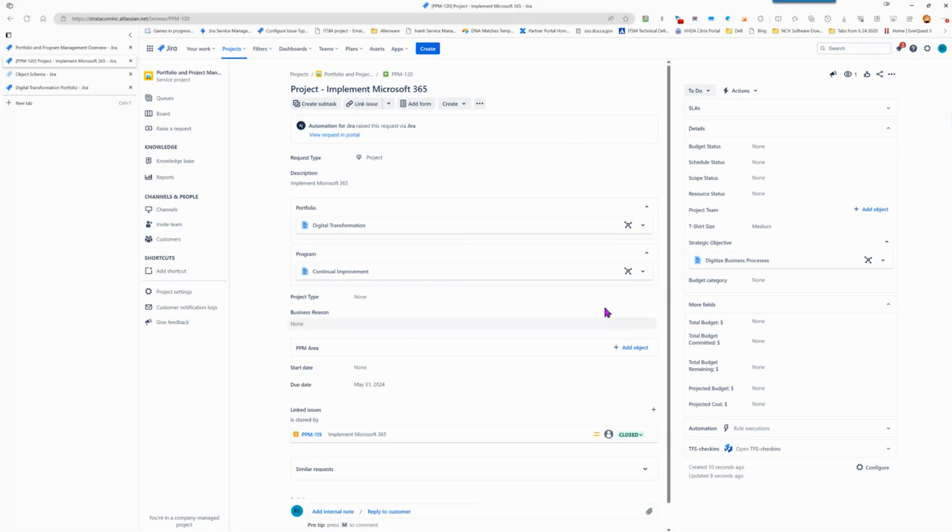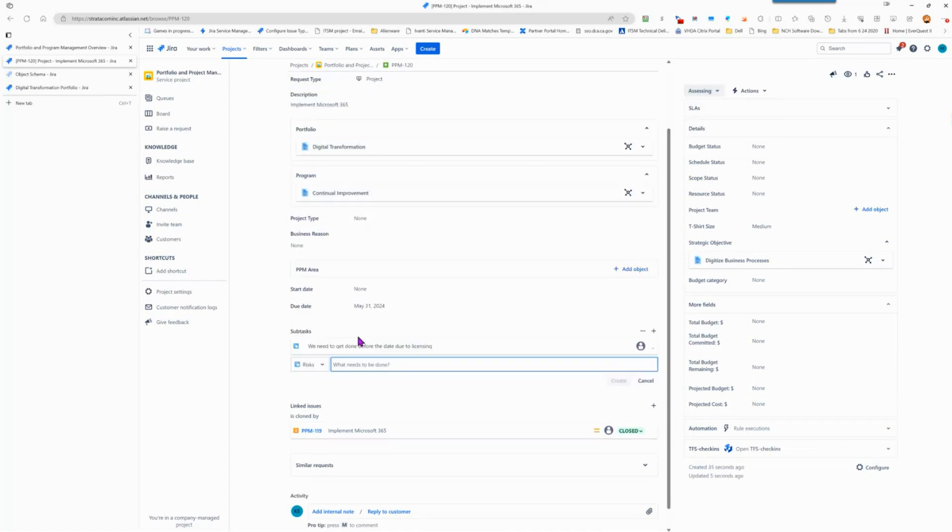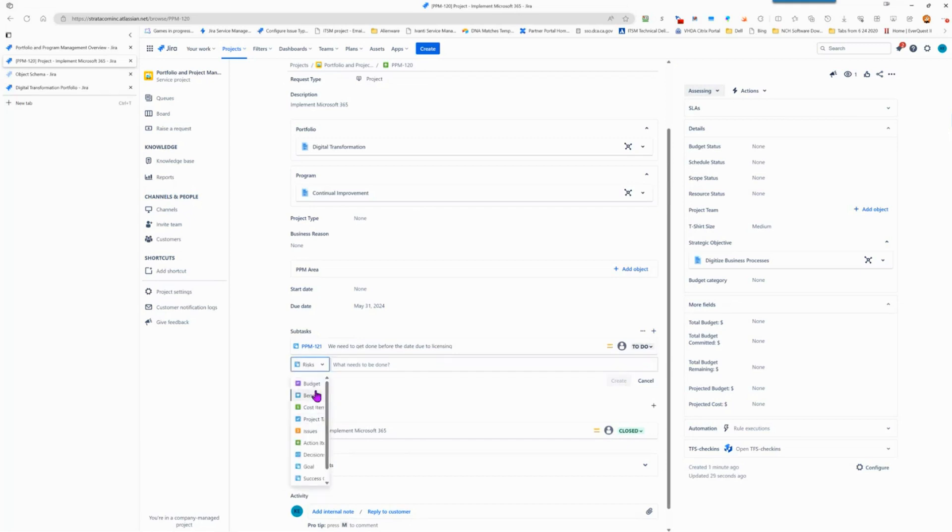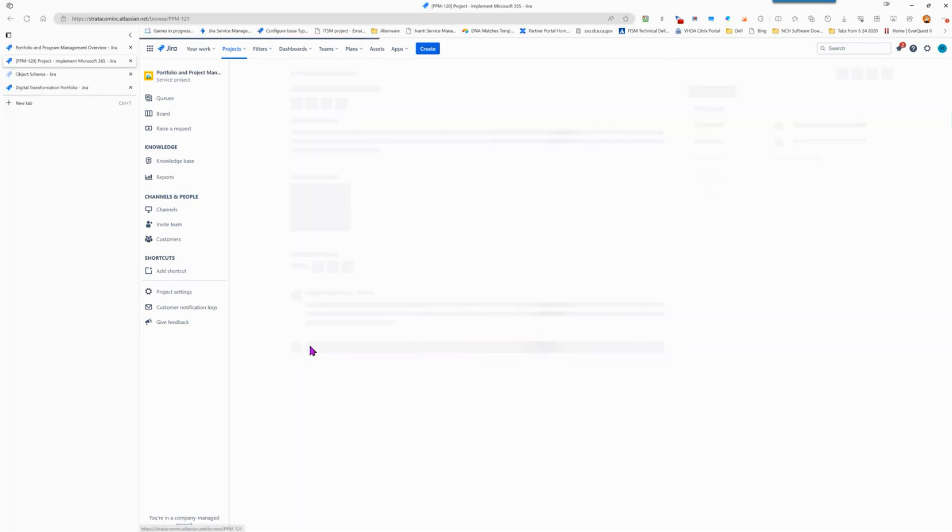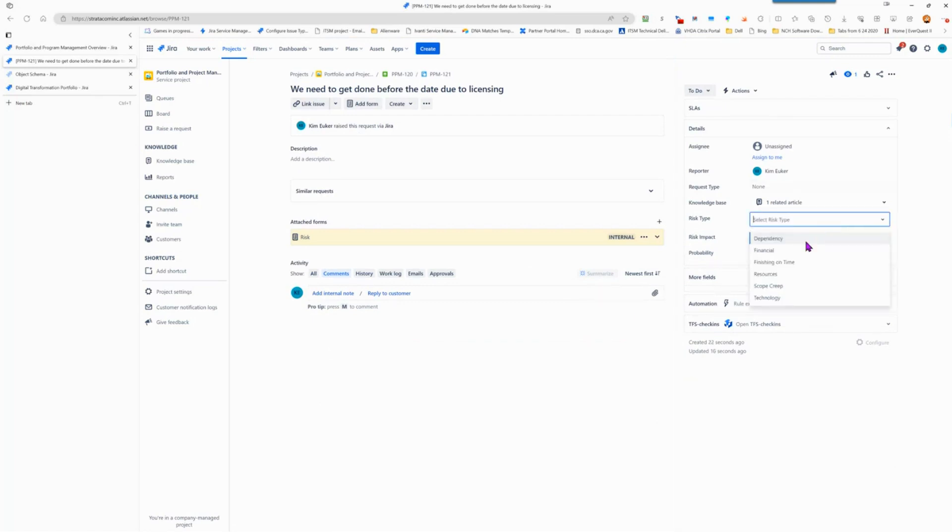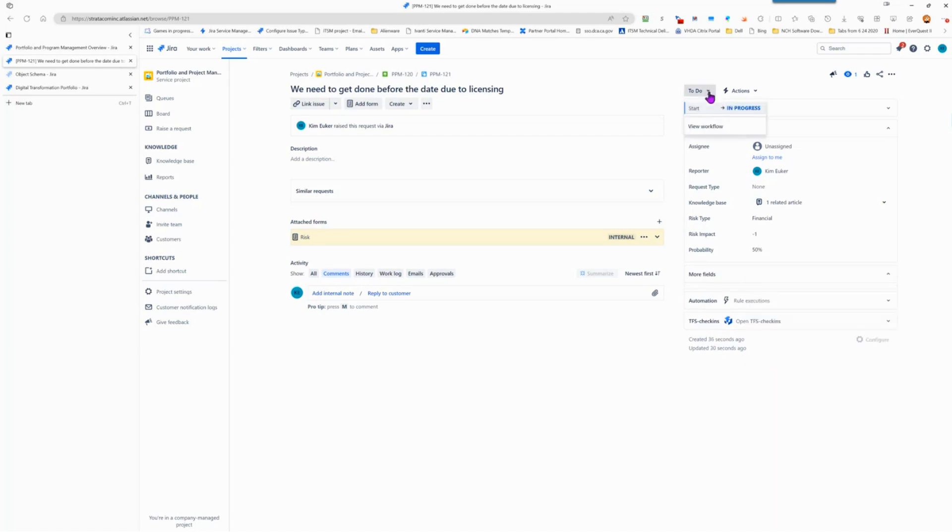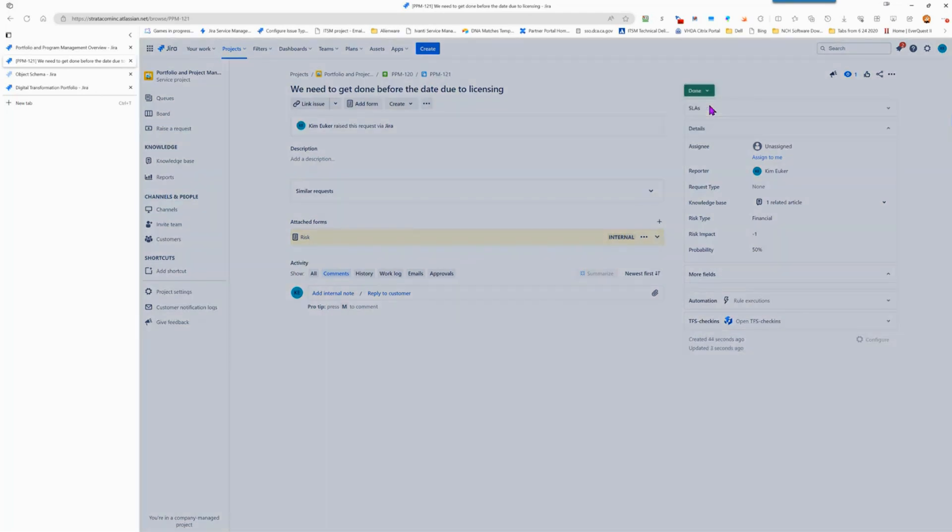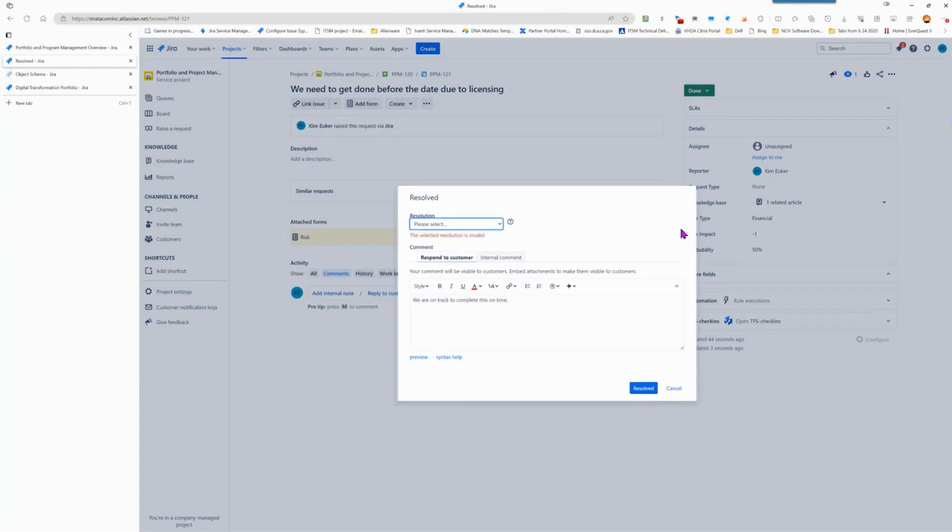Here, we can also walk through the process of going through and assessing and move that forward. We're going to actually put in some risks. So here you have the ability to put in any risks, budget benefits. All of those items are identified here as subtasks that will be attached to this particular item. You could drill in once you actually have identified and you can put in more information about that particular item, what type of risk it is, and what the impact to the organization is, and what is the probability that the risk is going to happen. And from there, risks can go from to-do to in-progress and then be identified as done.